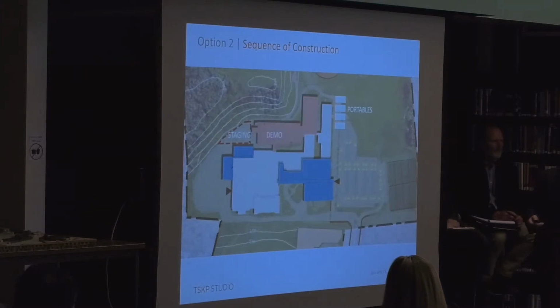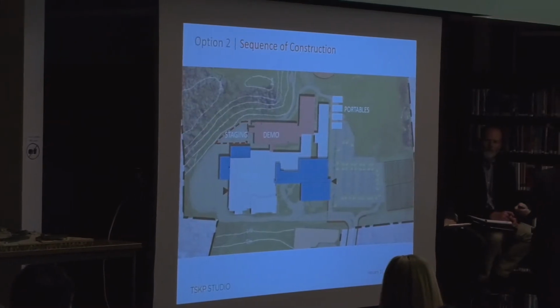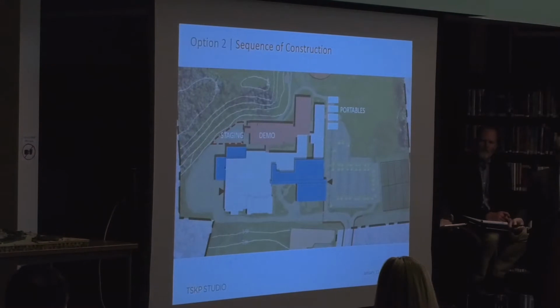And this is the last phase. Now, this is fully occupied, and we are planning to remove this portion of the building, but I think we should keep these things during renovation of this existing building. So use it as a swing space. So it's much easier to do a phased renovation of this existing building.